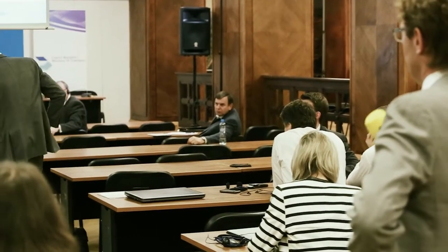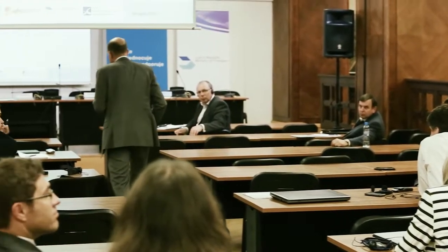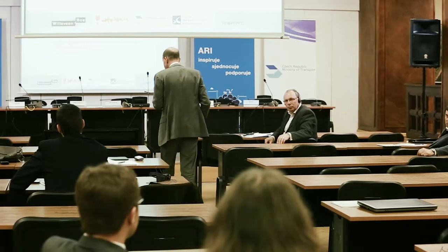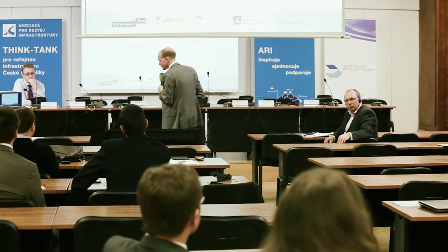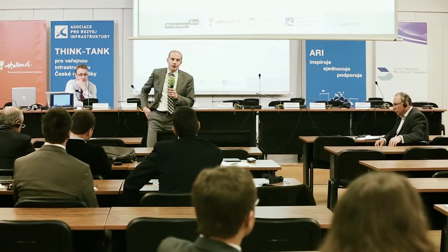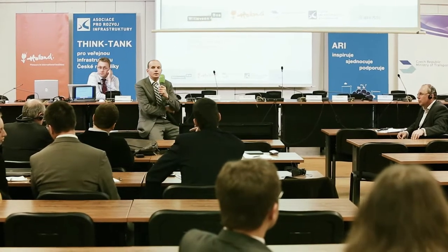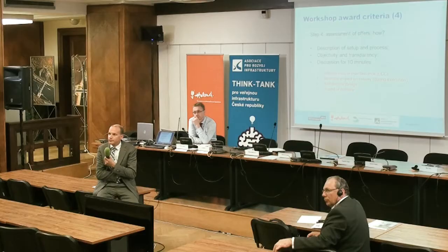Yes. Okay. Or perhaps what Wiebe told you, we have time slots. When you want to work at a railway, you have to give a time slot a year or even sooner. And well, perhaps if you have measurements that reduce the risk of this time slot being exaggerated, well, that's a possibility. So that's the way you can assess this element.